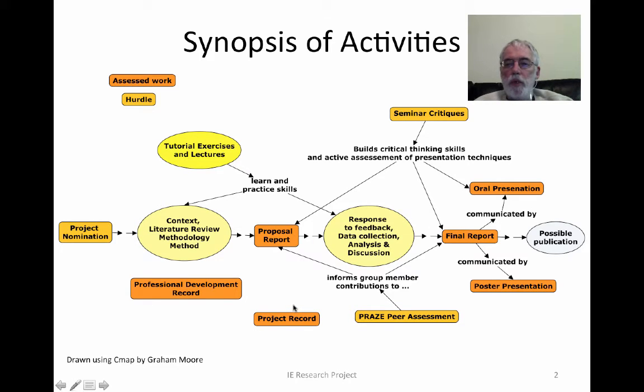If at the end of the project there is any question as to what happened during the project, for example, if you invented something and you wanted to patent the invention, then the project record will be what is used to establish the date on which the invention took place. Also, if you had any dealings with clients or other people outside your project, there would be a record of that happening in the project record.